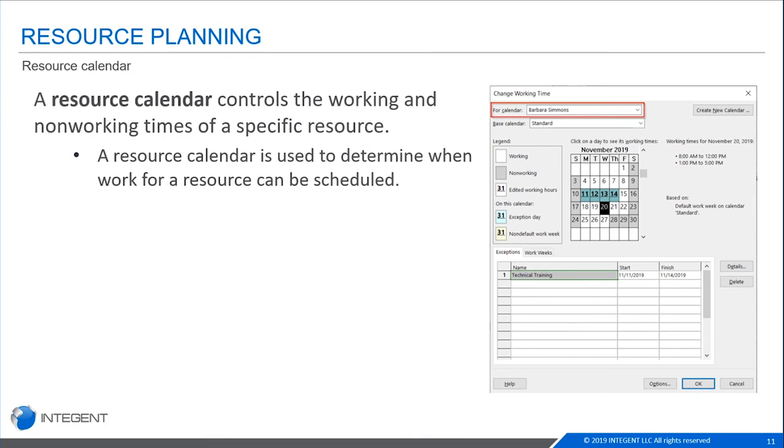even if that is different than your project calendar. If you have some resources that are only 4 hours a day available for project work, you can still have your project calendar be a standard 8 hours a day, 5 days a week, but have some resources with a little bit narrower time frame to work. If they're only available 4 hours and I assign it to a task, the task will use the resource calendar to calculate that time. It will do a blend. It'll say it's a working day. That's what the project calendar tells me, but the resource calendar says this person is only available 4 hours. And so, it will lengthen some tasks or adjust things accordingly to give you that accurate representation of your current calendar.